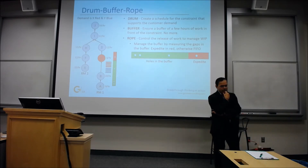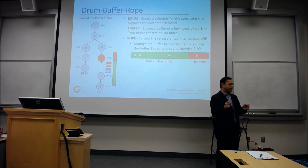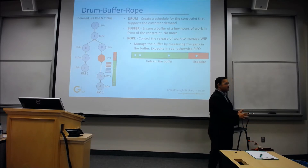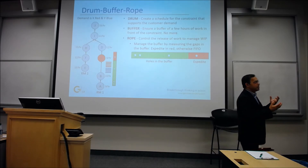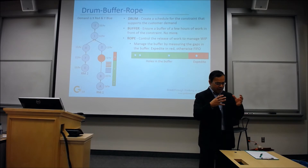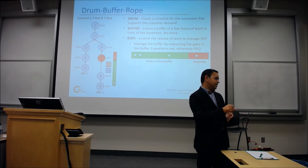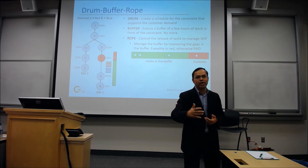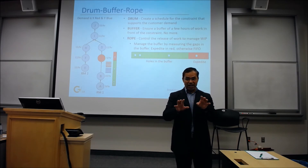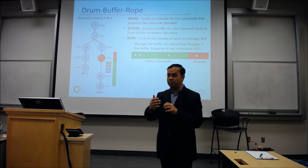In production or manufacturing, a lot of the time the touch time to lead time ratio is very small. The machine will process something for like 30 seconds, but the queue time in front of the machine is going to be like two hours — so the lead time ratio is almost 1-to-7 or 1-to-10. In projects, you'll find it's very different: a software engineer will code for three days and give a duration of six days. That is the basic difference between production and project.